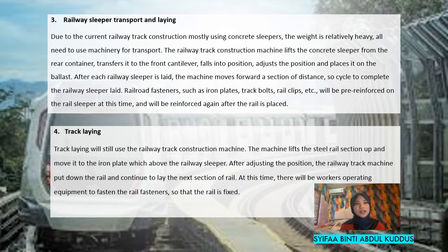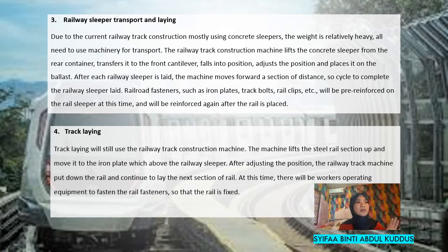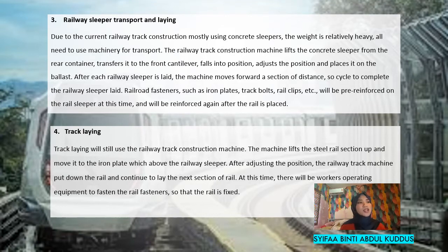The third step is railway sleeper transport and laying. Due to current railway track construction mostly using concrete sleepers, which are relatively heavy, machinery is required for transport. The railway track construction machine lifts the concrete sleeper from the rear container, transfers it to the front cantilever, drops it into position, adjusts the position, and places it on the ballast. After each sleeper is laid, the machine moves forward. Railroad fasteners such as iron plates, track bolts, rail clips, etc. will be pre-reinforced on the sleeper at this time and reinforced again after the rail is placed.